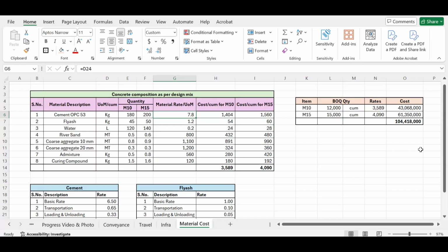Okay. So what I'm assuming is that I have my own batching plant for the entire project and I'm manufacturing my concrete in my own batching plant instead of taking it from external RMC. RMC stands for ready mix concrete, wherein some external agency we will hire and he will produce the concrete in his own plant and supply that concrete to our site for the entire scope or for some certain scope. But right now I'm considering that the whole of the concreting is being produced in my own batching plant that I have set up as a part of plant and machinery at my site.